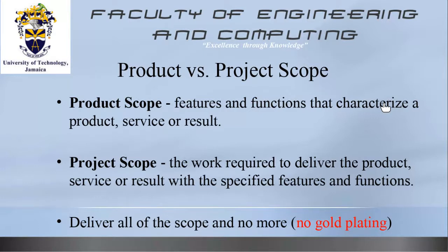What I didn't say, and since you have asked a question, let me expand on it a little bit. In the situation I explained just now, the project manager had to get a backhoe, come back in, and break down the lady's perimeter fence, which had electrical wires running on top of it in hidden conduits. So when he broke that down, he had to disconnect electricity, and re-engage his electrician to come back and rerun those things. All of those are wasted costs, wasted monies, because he has responsibility and liability.